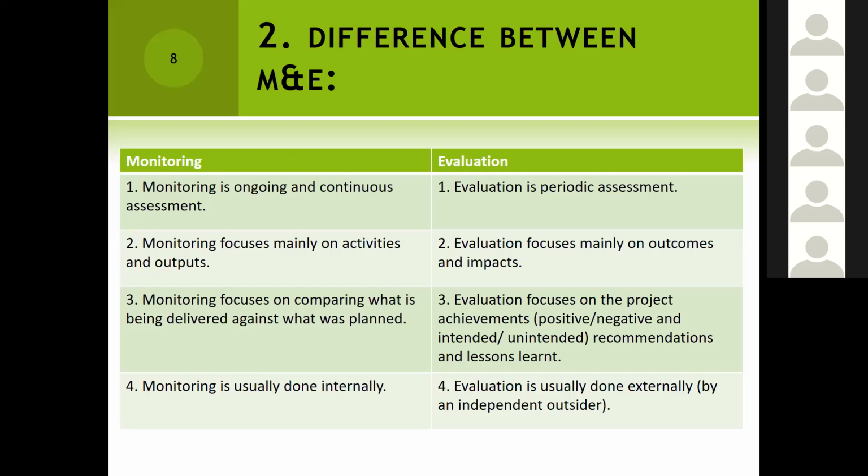That's what we are trying to target. And then finally, another key difference between monitoring and evaluation is that monitoring is usually done internally, and that's something that we are able to see, whereas evaluation is usually done externally, that is by an independent outsider. So monitoring will be conducted internally, and most of the time evaluations are considered good to be conducted externally, maybe through an independent outsider as much as possible.